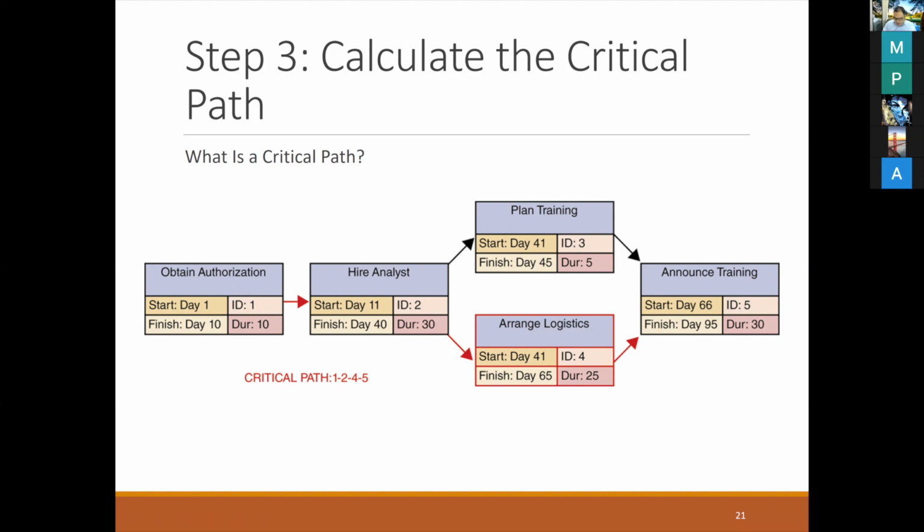We draw like this, let me show you a bit, the PERT CPM diagram. Okay, this is what we call the PERT CPM diagram. They just draw the task number in the circle, and then they draw the arrow like this. After that, what do they write for the arrow? They write down the duration.